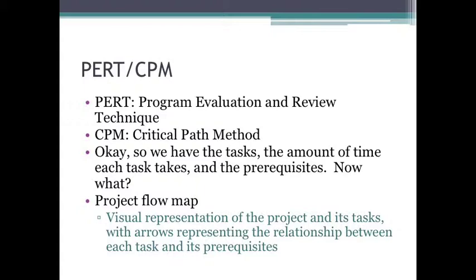That said, you will probably find in the book two different techniques used with PERT CPM. One known as activity on node, the other known as activity on arrow. And you'll see these every so often. That said, what we are going to learn in this class is activity on node. And there is a very good reason why. Activity on arrow is a kludge. In order for it to work, some things are added to the technique that frankly are superfluous.